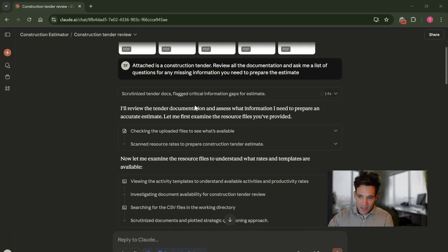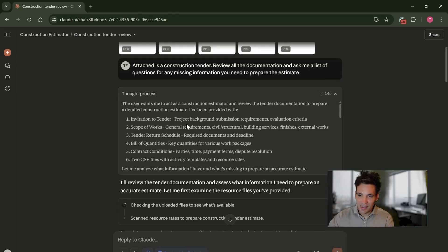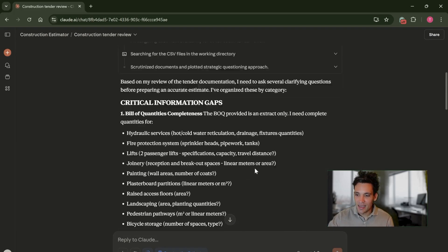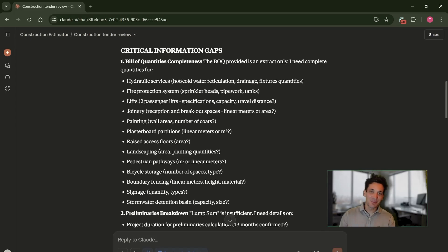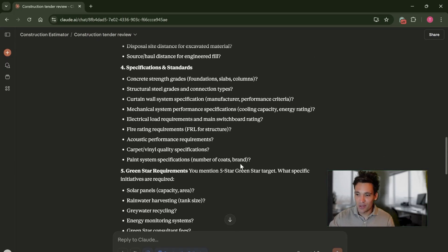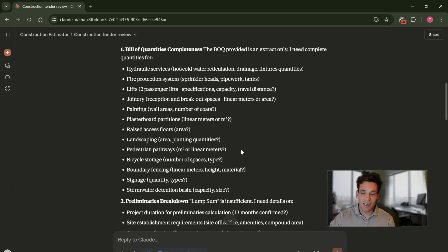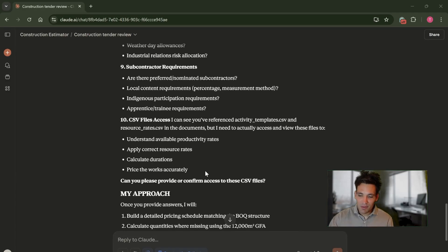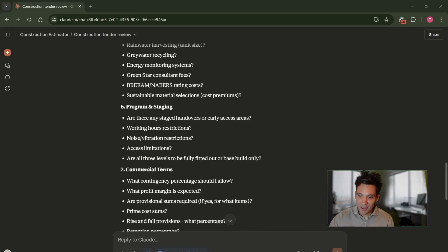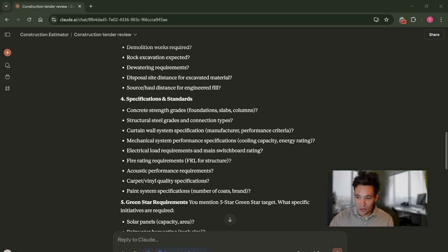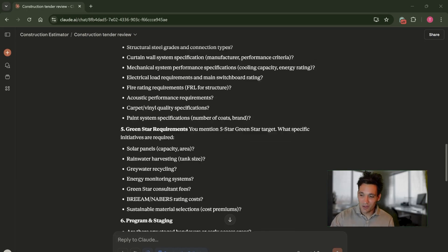As you can see, it's listed out its reasoning and how it's processed the documentation — you can actually look and see its thought process for how it's dealing with the information. And it's given me a massive set of questions. If I was treating this as a serious estimate and cared deeply about accuracy, I would go through and respond to every one of these questions and investigate gaps. It's asked some pretty decent questions: who bears the design risk, latent conditions, do we have to install solar panels, are there acoustic performance requirements, electrical load requirements, and ratings of the main switchboard.